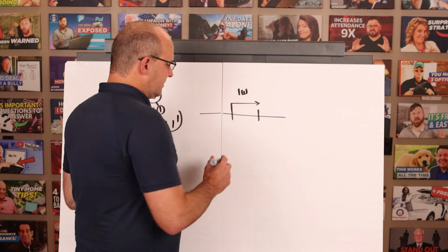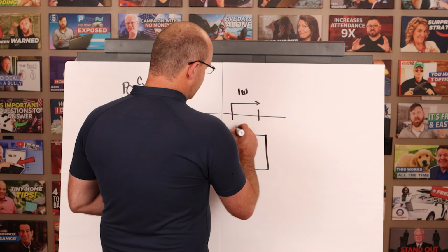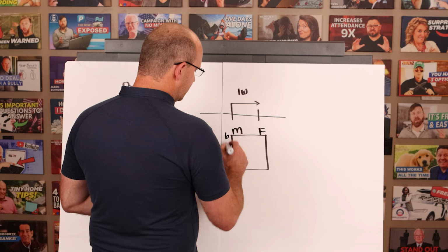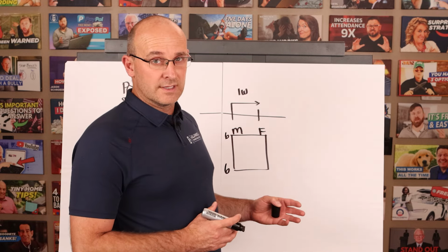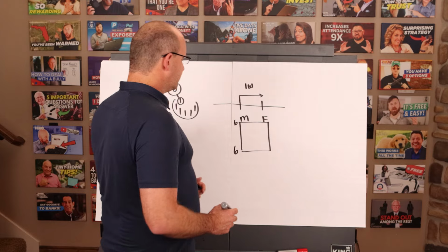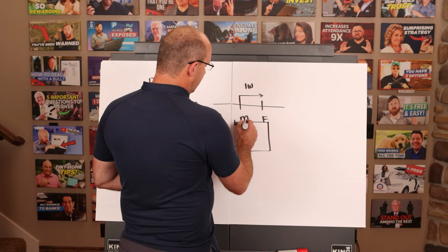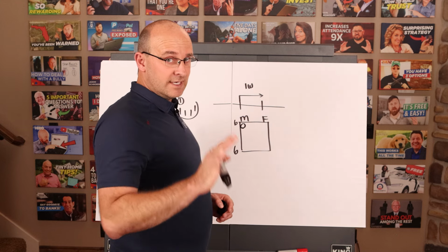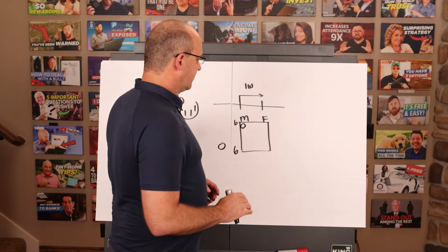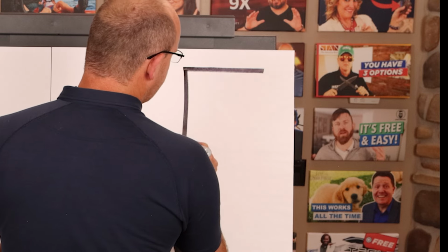And real quick, let me just say this. If you're looking at it from a calendar standpoint, like Monday through Friday, like I typically like to do, 6 to 6, there are a couple of events that happen within the week. Let me talk about those now. Number one, sprint planning. So the sprint planning can happen the week before, which I recommend, or the Monday of the week of. And this is where, and I'm going to give you the visual that we're going to look at here. There's something called a Scrum board, okay?